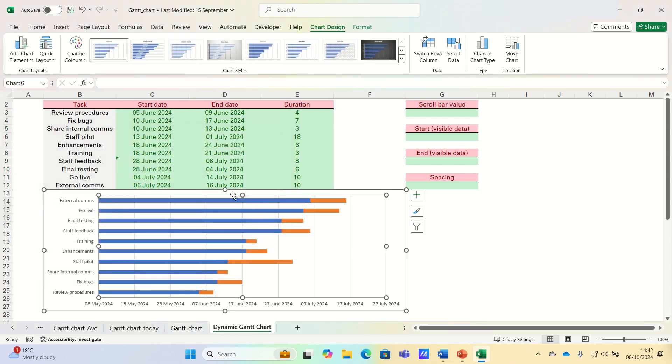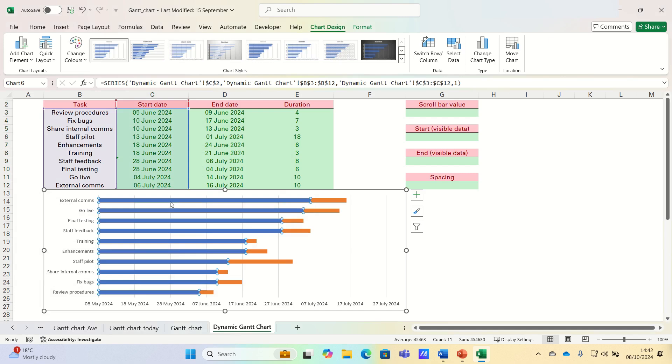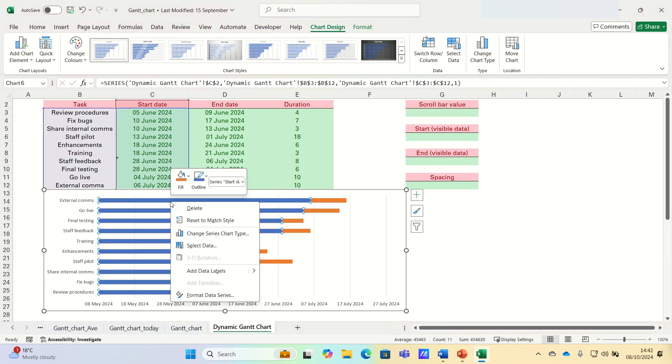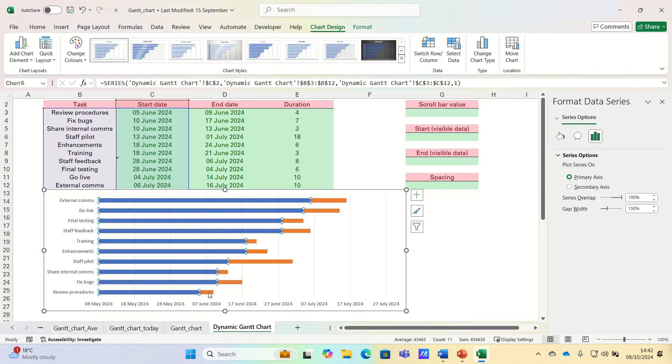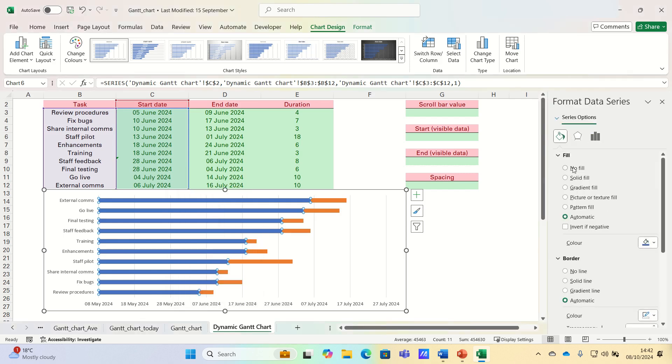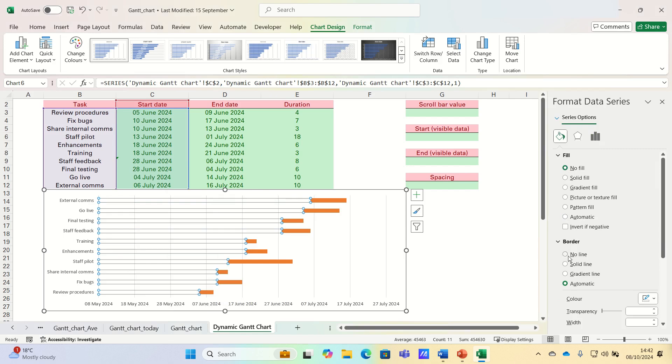The chart will now look something like this. Next, click on any blue bar, right click and then select format data series. And then remove the fill color and remove the borderline as well. This will ensure that only the duration of the tasks between the start and end date are showing.